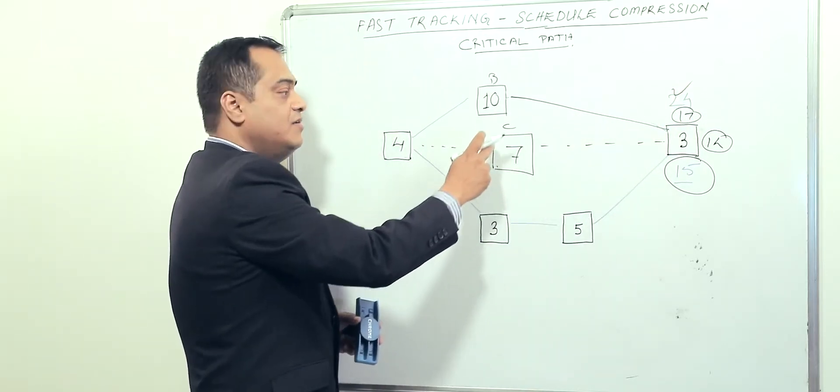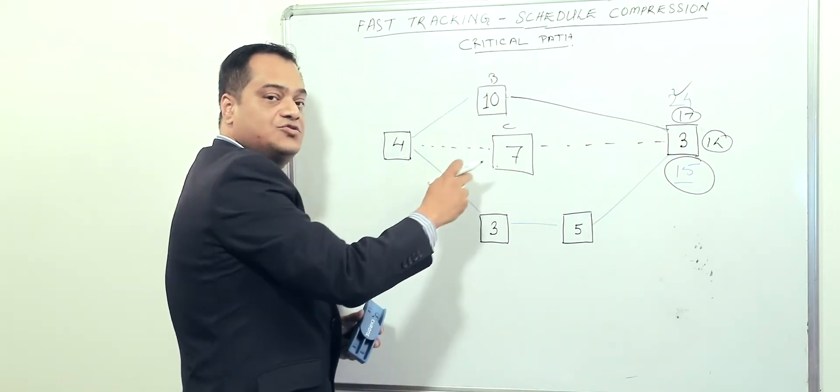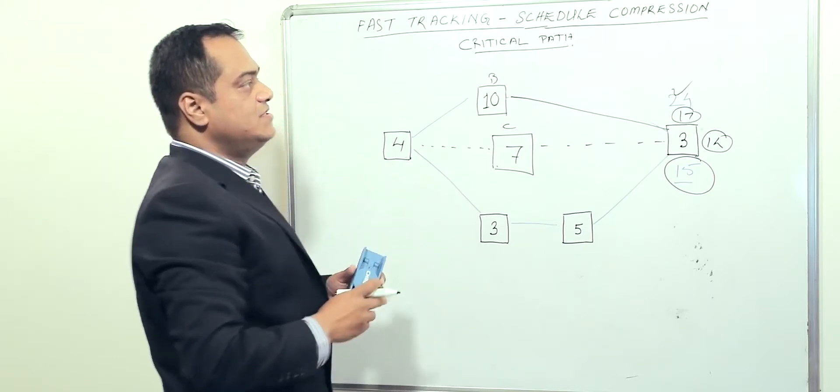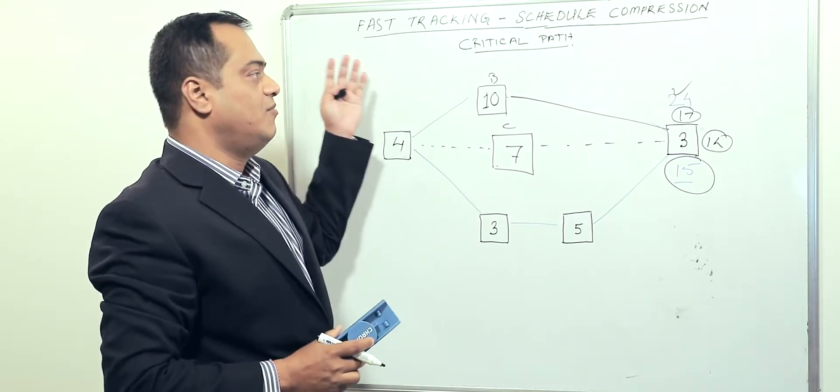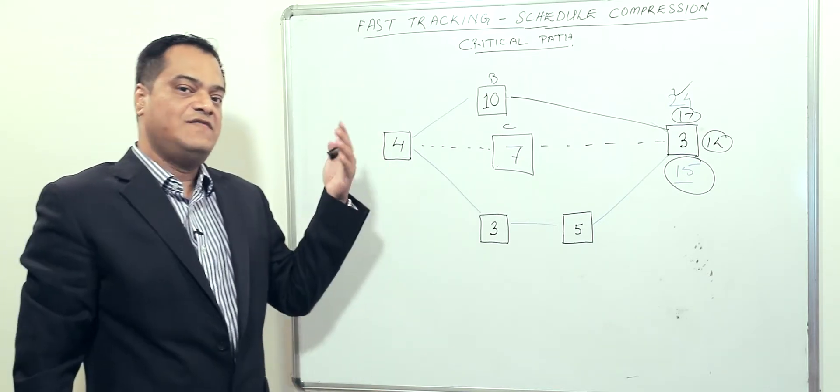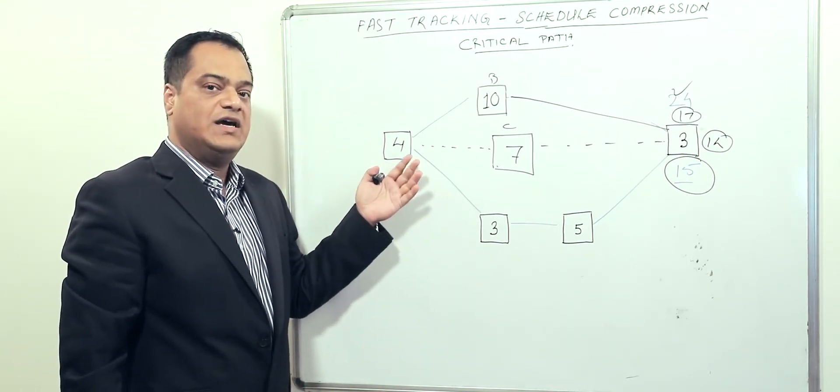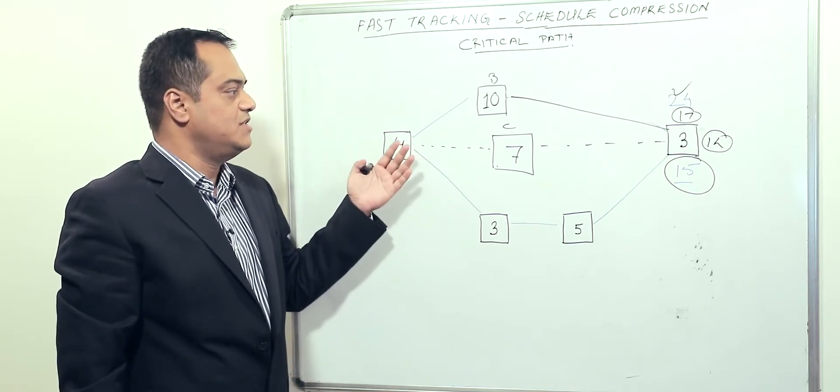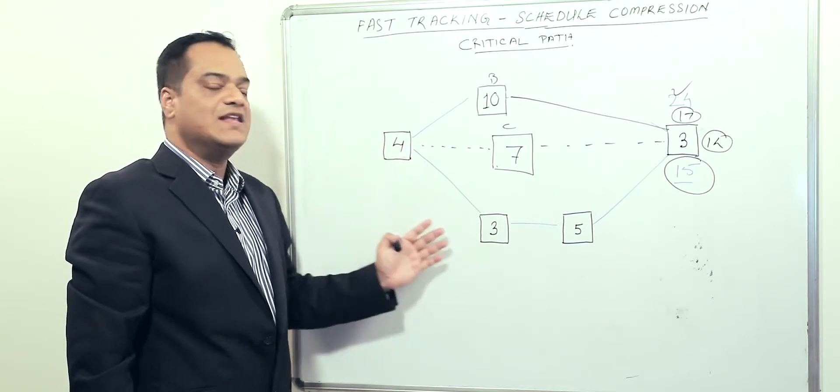You can see we've cut down from twenty-four to seventeen by running activity C in parallel to B. This is schedule compression by fast tracking. Obviously, this doesn't involve any costing, but you run into risk because now you have to rework the entire network and see if this is workable.